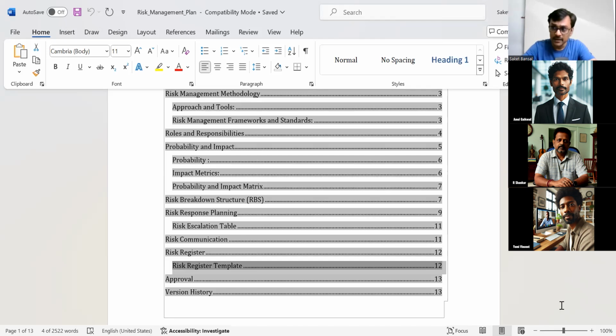Yet it may be like that sometimes, depending upon your risk management plan. For one project with a duration of 1 month, 10 days delay is a super delay. In another project where duration is 1 year, 10 days delay may not be that much. You can say a milestone getting 10 days delayed is okay. There is a variability associated with a 1 year project. So there could be something which is guided by the organization.